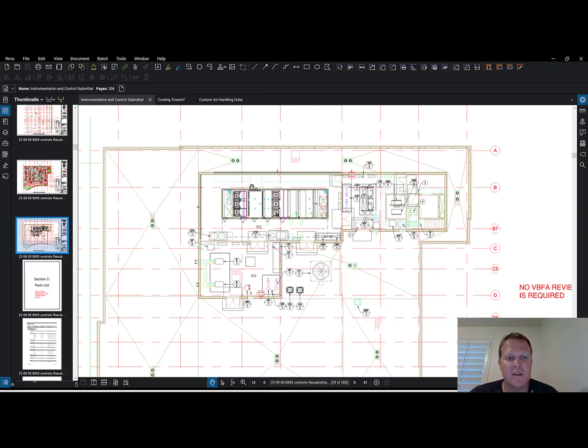It can be a real challenge to think like that. Mechanical, electrical, those types of rooms are super important to pay attention to and schedule and get sequenced in first, as well as the submittals. I think submittals are kind of easy to understand: now this is long lead equipment, got to get it through the submittal process.